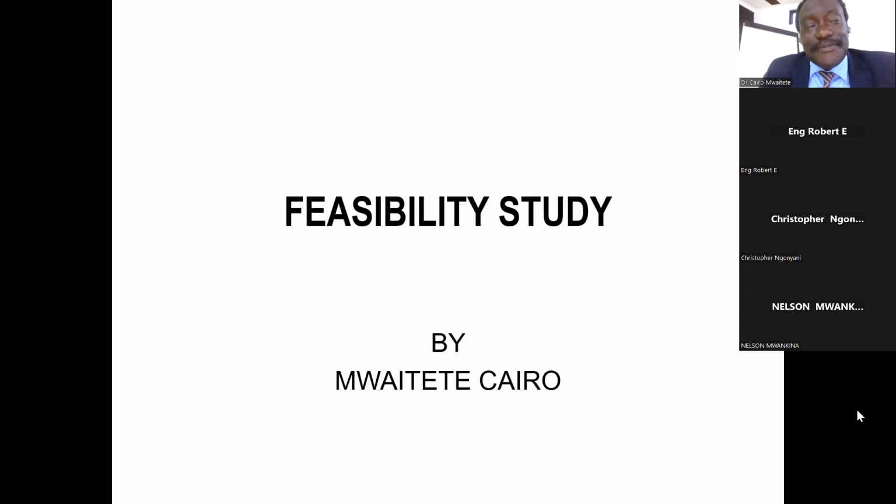Now, depending on the direction of the project, you may pursue. If it is commercial, you will have to carry out a feasibility study. If it is non-commercial, you will have to undertake the needs assessment. You assess the need. You don't assess whether it is feasible.